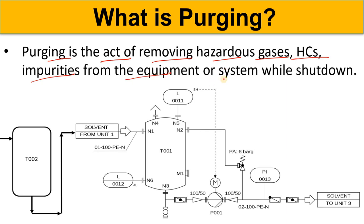Purging is done from the equipment and the system while shut down. First of all, we take the shutdown, and then we start purging the lines and the equipment before handover for maintenance. We do that because we want to remove and eliminate the hazardous gases or hazardous atmosphere.